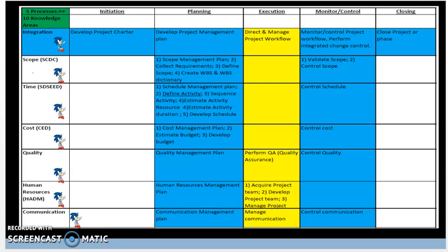After collecting requirements from relevant stakeholders, it is now time to define the scope of the project. The purpose of this process is to set the boundaries of the product, service, or result in regards to which requirements are considered in scope and out of scope for the current project or phase. Similar to the collect requirements process, which we just talked about earlier, the define scope process is a critical element of the project and must be very thorough, with clear understanding from the business and IT sides of the house.